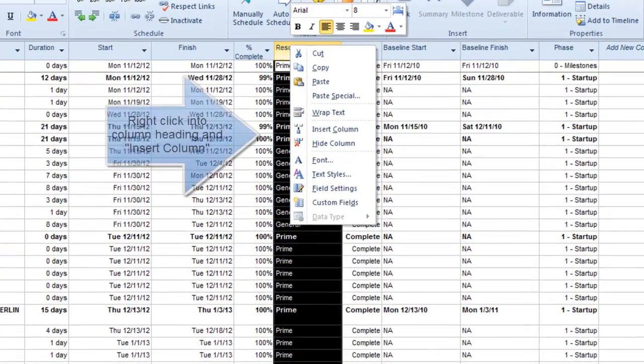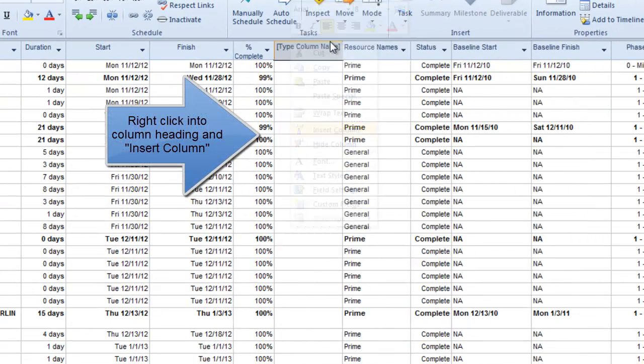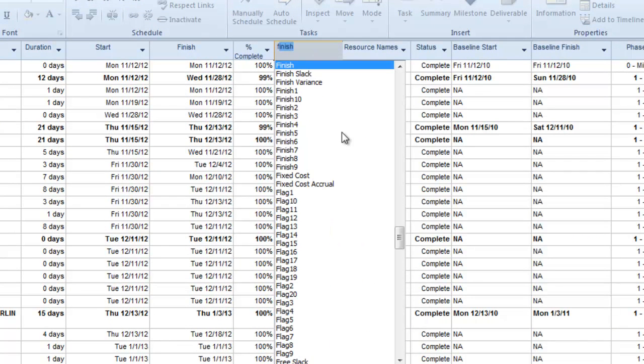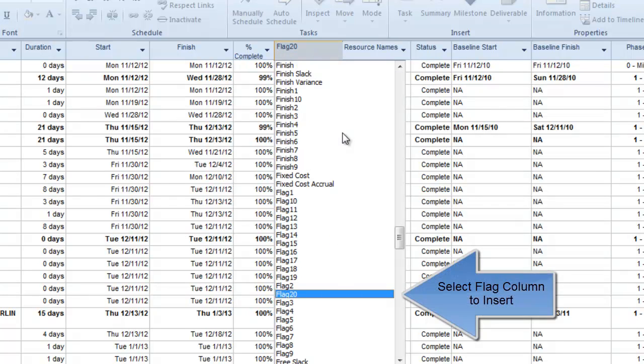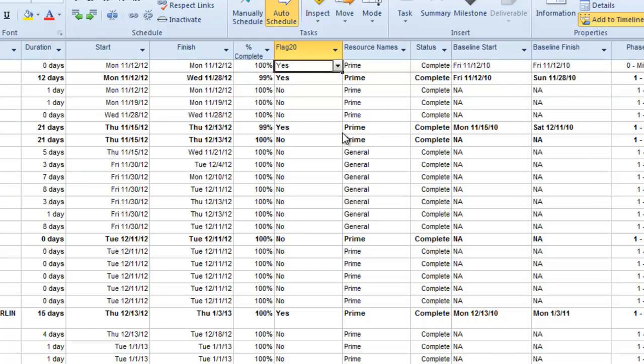If you want to be selective about which line items in your plan are within your one-pager view, insert a flag column into your project document. Then, put a yes next to the tasks and milestones to be used in your view.